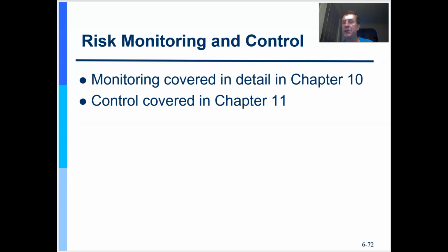And then, of course, we're project management. We are all about control. So when I say monitor and control, watch for triggers, things along the way that indicate the risk is coming. If I'm building a house in South Carolina in August, what are going to be my triggers, my indication that a risk like a hurricane is on its way?